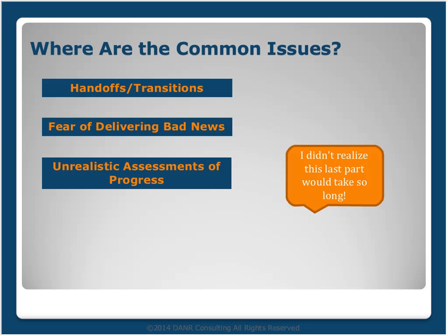So let's look at another one, which is unrealistic assessments of progress. In automation projects, we don't deal in the physical world. If you're laying brick for a house, it's really easy to see that you're either making the progress you should or you're not. You're falling behind. But in automation projects, that's not as easy to do. It's not as easy to gauge when you're doing graphics configuration whether you're 80% complete or 90% complete. It's not as easy to gauge when you're configuring logic, where you're at in that process.